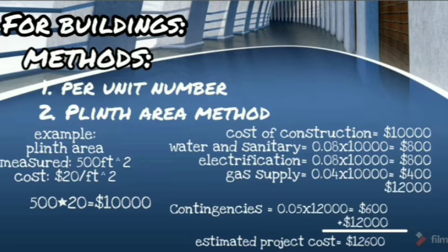Computed amounts will be summed up at ang 5 to 10% ng total nito ay ia-add din kasi ito yung mga contingencies or mga additional charges na para sa mga urgent basis habang ginagawang project. Kapag nasama pang lahat ng ito, makukuha na natin ang rough cost estimate ng building. Kapag multi-storied ang building, separate cost is determined for each story.